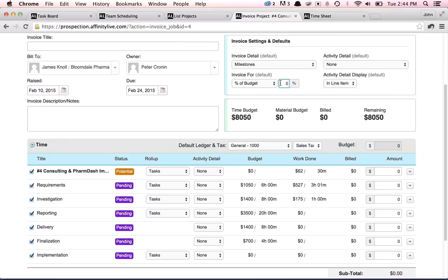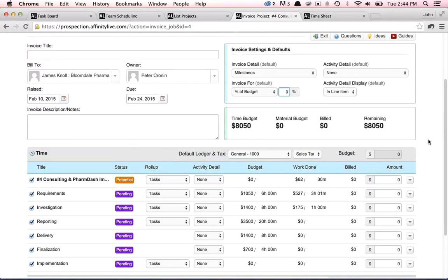But in this case, how do you normally invoice for a project? Is it done by stage? Is there a down payment? There's a combination. So sometimes there's a 50% up front and then a final bill. Sometimes, like I said, there's a quarterly retainer that's paid. Sometimes it's up front and sometimes it's just at the end of the project. Okay. So from this invoicing, the upfront down payment and then the end of the project can be done right through here. And then, like I said, for that quarterly payment, we would probably want to loop it into a retainer.